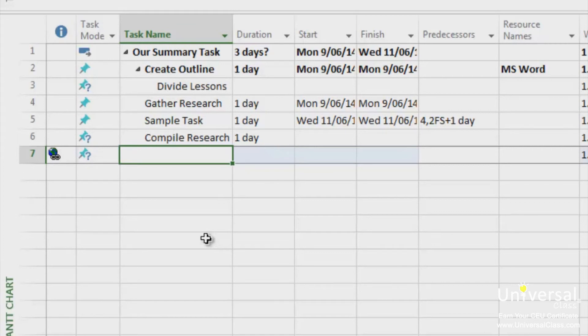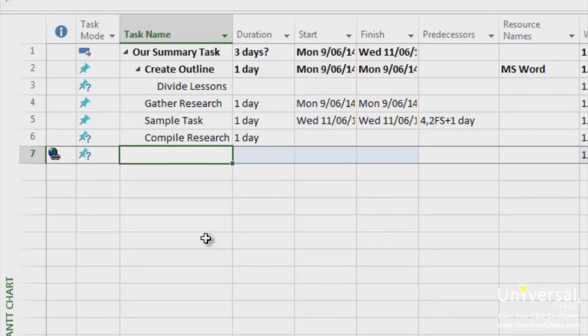This happens when you have entered a start date for a task or you have assigned a resource to a task and the resource is not yet available. Constraints. This condition can happen when you apply a constraint to a task that won't allow it to start until a certain date. Dependency relationships. A predecessor task can cause change to a task's timing.